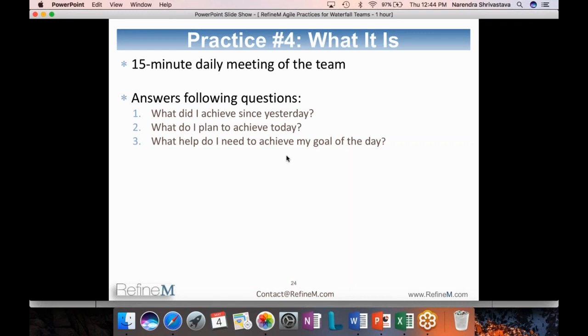So this is a very, very effective way to have transparency and identify showstoppers very quickly on a daily basis, and then act on those showstoppers so the team moves faster. So transparency, showstoppers, and efficiency, that is what a daily stand-up gives you. Very, very important, very useful practice that all the Agile teams do. And every team member should come prepared to contribute. And how you can finish in 15 minutes, that's a struggle for many teams. They are not able to finish. This 15 minutes becomes a half an hour meeting, maybe an hour-long meeting, who knows.